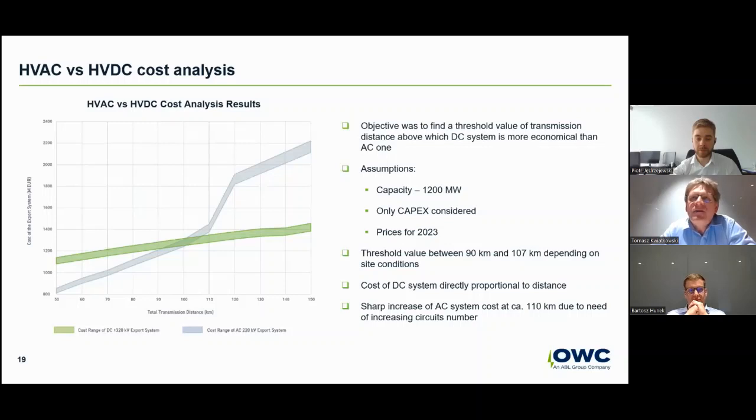Probably a year ago, if I remember, there was a huge story about a high voltage DC substation in China that basically could not be picked up by cranes in general because it weighed 22,000 tons. So it was put into place by other means, by barge. So the short answer is yes, we do, but it's on a case by case basis, depending on the capacity.